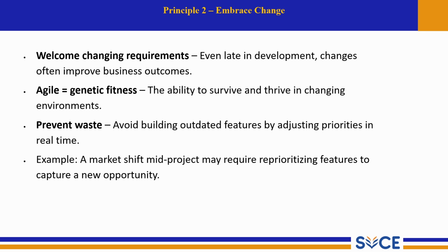For example, a market shift mid-project may require reprioritizing features to capture a new opportunity. Imagine you are building a mobile app and suddenly a new competitor launches a similar app with advanced features. Instead of sticking to your old plan, Agile allows you to quickly shift your priorities. You can introduce new features earlier to stay competitive. This flexibility is a key strength of Agile. So Agile welcomes change instead of fearing it.